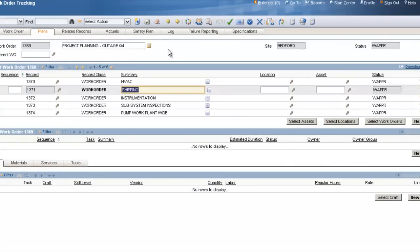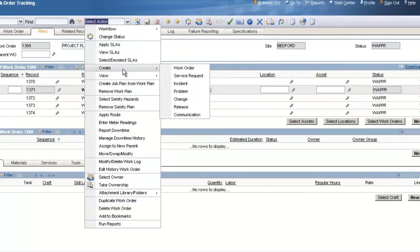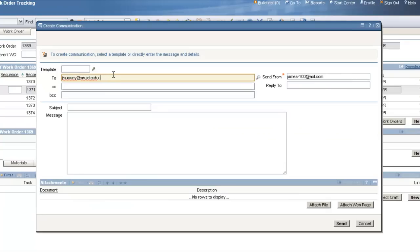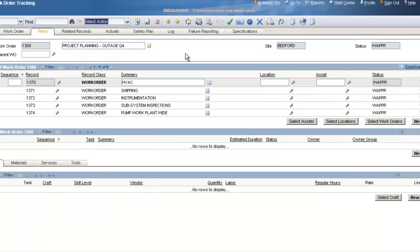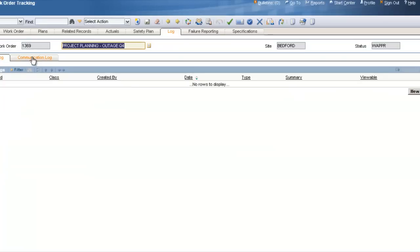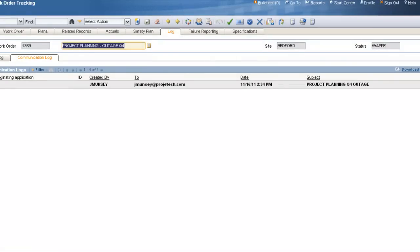One new feature in Maximo is the Communications feature, which allows you to send an email notification directly out of Maximo. You can use this to notify your department heads. Click on Select Action and slide across to Create Communication. Just like any other email, enter the email address, a subject, and a message to alert all department heads about the work orders they need to be planning for the outage. Now all my department heads are notified, and we have a record of that email on the Log tab under the Communications Log sub tab.